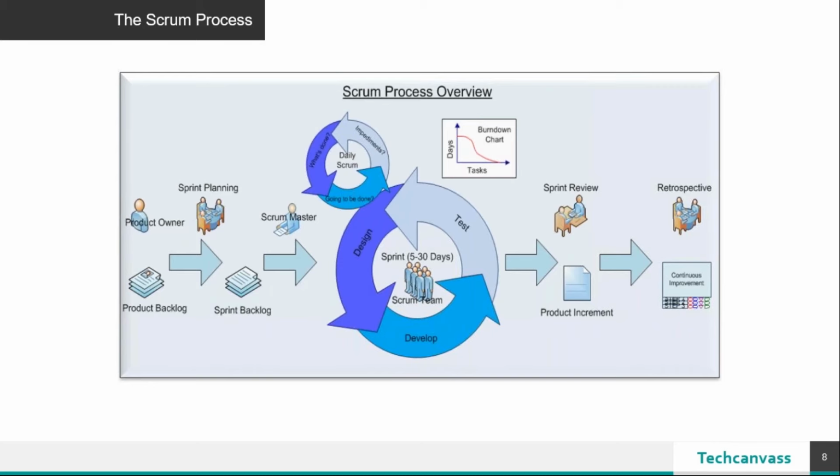The product owner and the business analyst would explain the stories to the team, and if the team members have any doubts or anything that needs to be clarified, it's all clarified during the sprint planning itself. And then the team as a whole commits, okay, we will pick up the top five stories for this sprint. That's what is decided in the sprint planning, and then your sprint backlog is formed. The Scrum Master's role in this case is just that of a facilitator, somebody who is there to remove impediments, if any.